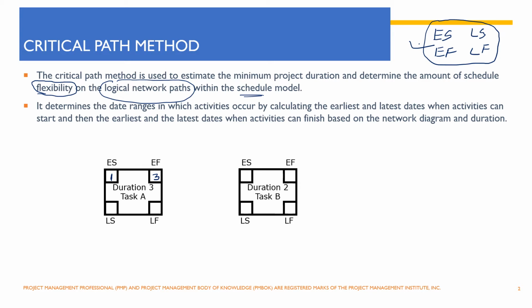because we will require 3 days for that activity to complete. Now latest by when activity B can start depends on the finish date of the earlier activity, because there is a relationship between these two activities. So this activity can start on 4th of January and it will require 2 days to complete. So earlier this activity can complete is 5th of January. So that is earlier finish date. This is earlier start date.